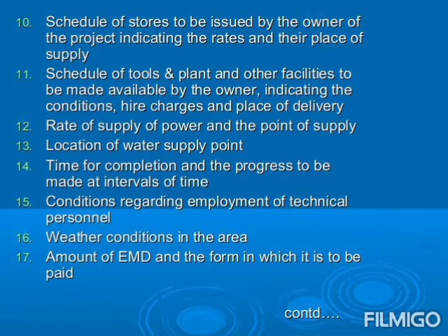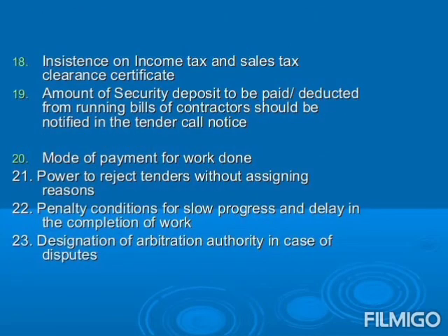Number 14. Time for completion and the progress to be made at intervals of time. Number 15. Conditions regarding employment of technical personnel. Number 16. Weather conditions in the particular area. Number 17. Amount of EMD and the form in which it is to be paid. Number 18. Insistence on income tax and sales tax clearance certificate.